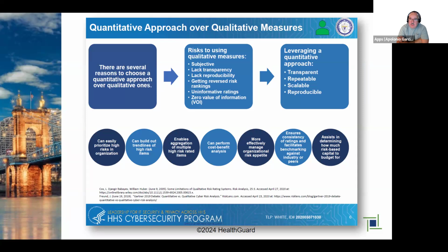As you see on the screen, some of the challenges with using qualitative methods, according to HHS and also in our experience, are that they are overly subjective and tend to lack transparency, because you're trying to distill a very complex issue into a single number or color. The ratings are sometimes uninformative. If you have a risk of a 10 or a risk of a 25, what is that really telling the decision maker? You could say there's value in rank ordering risk, a 20 versus a 25, and that's true. But with those traditional qualitative methods, the way you get there is often suspect, and I would argue it's almost always suspect. So there are some challenges